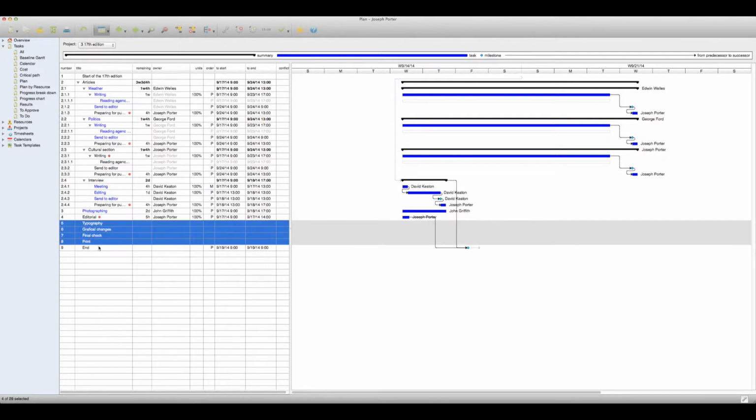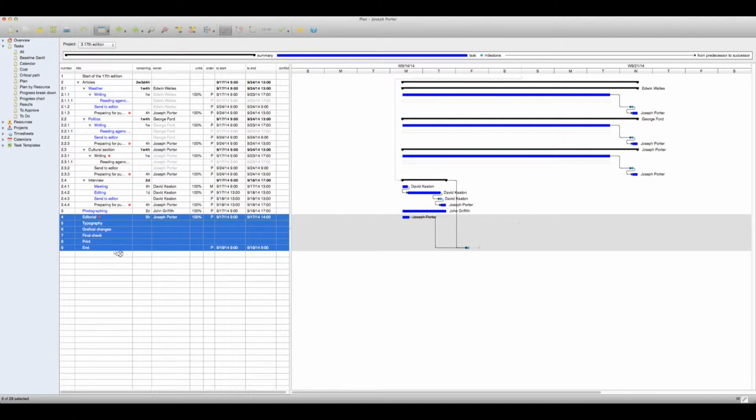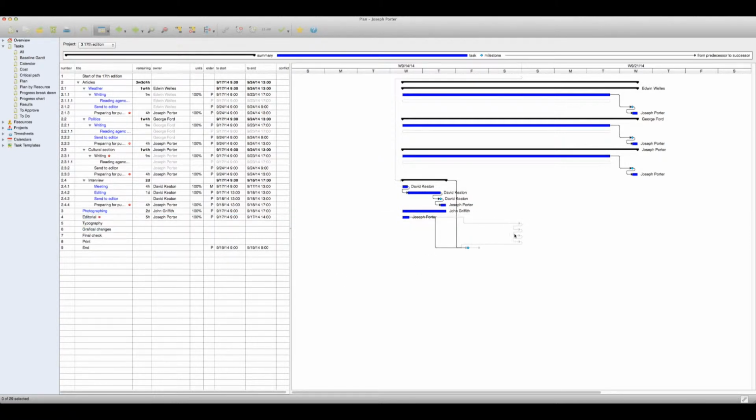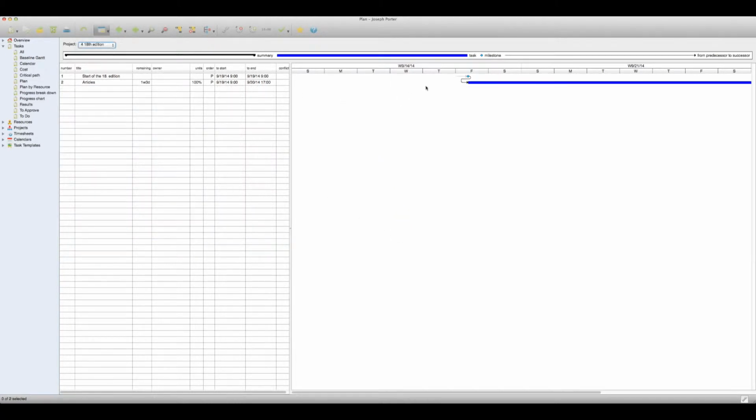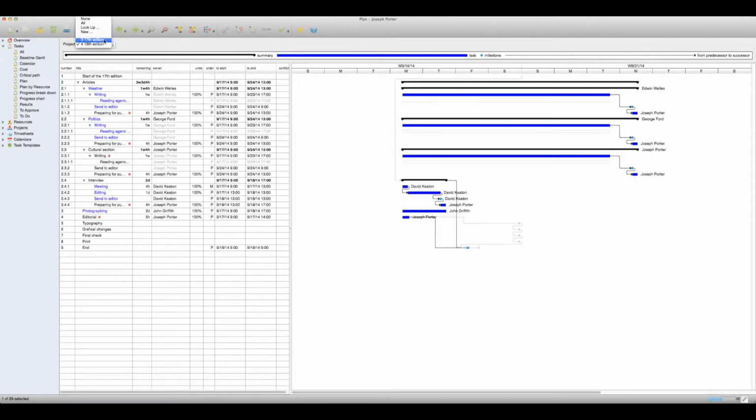If a predecessor or a successor is unscheduled and thus doesn't appear in the chart, then the predecessor-successor relationship is represented by these gray arrows. Another situation when we can see these so-called hidden arrows between predecessors and successors is if one of them is filtered out from the displayed report. For example, if one of the tasks from a project is followed up by a task from a different project.